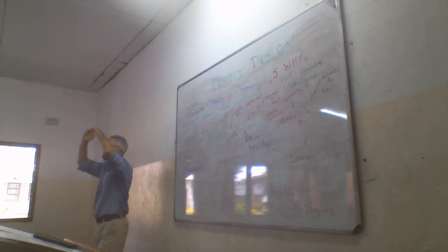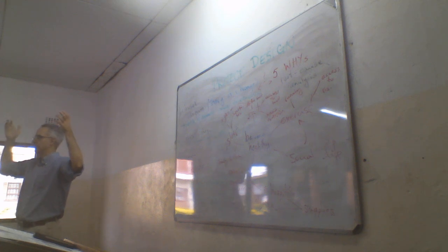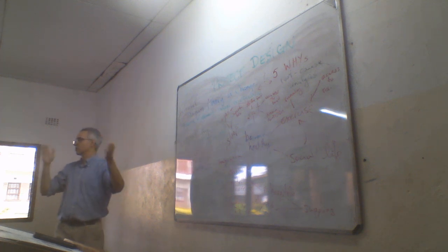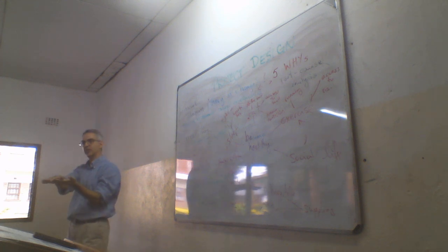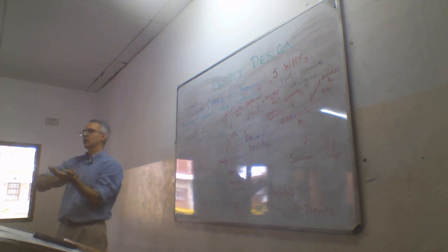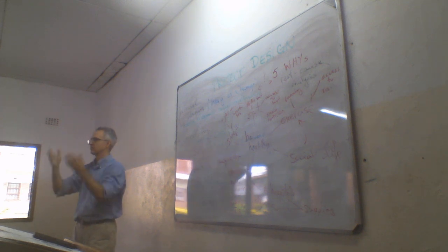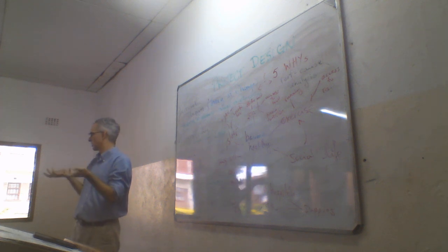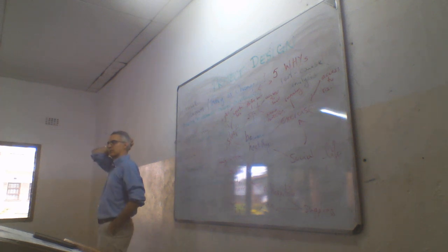Remember we started saying, if you want to know whether your project succeeded, you need to be able to measure something. What is it you're going to measure? Is the next question. So you know I need to measure things. The baseline, where we started, where are we now? How many wells are there now? How many people are educated? How many girls have completed Standard 8, 4, whatever, university? Whatever the thing is you're interested in, what are you going to measure? And often people get really confused about what to measure.